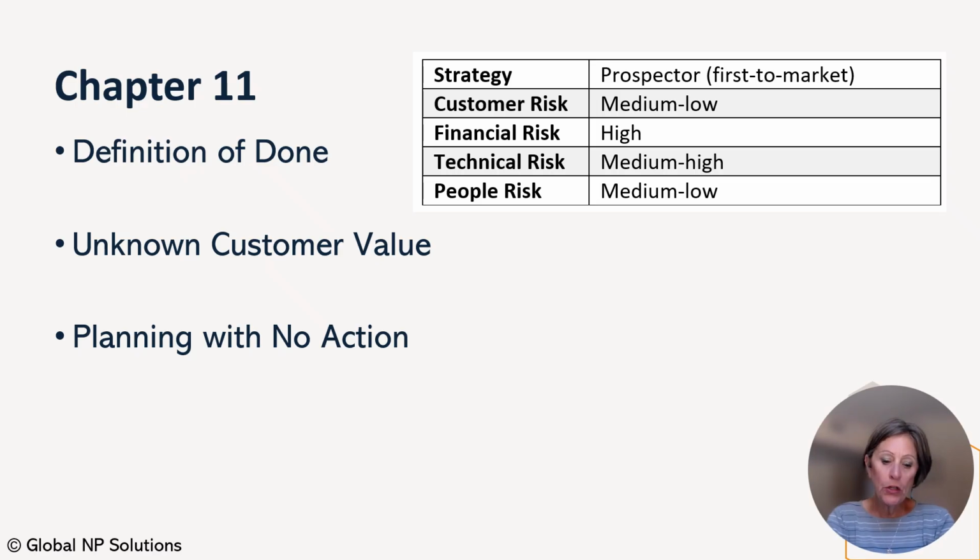This resulted in huge distractions from ongoing work, including quality and maintenance, so that even tiny tweaks for new product functionality were falling behind schedule. Development teams were redirected to new activities as frequently as once a month. So while the Agile philosophy encourages adapting to change, change for the sake of change is paralyzing to an organization.